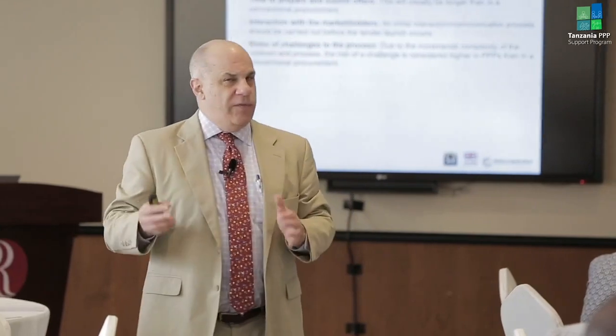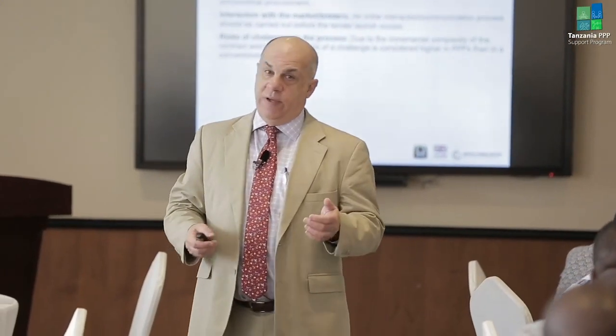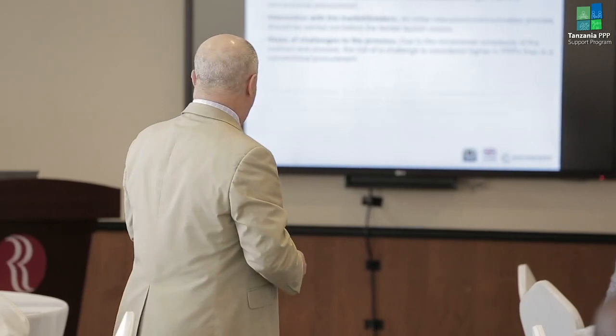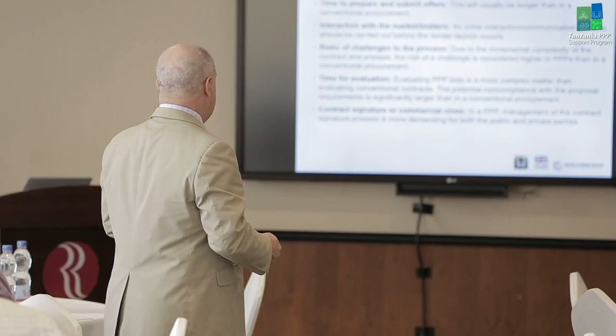Because these projects, these PPPs, can be more complex, it can give rise to bid protests, right? Parties that don't win, remember, they may also be spending a lot of money to try to win these projects. If they don't win, if they think your process was a little hinky, which is a technical term for not following all the rules, they may file a protest. So it's very critical you do that. As I said, it could take longer to evaluate the process.